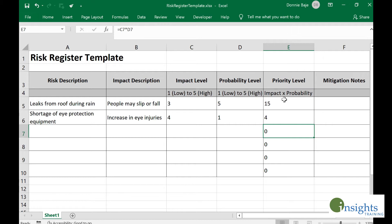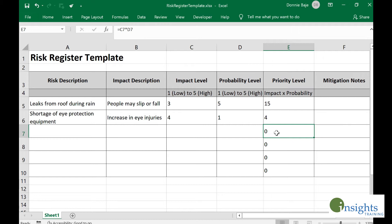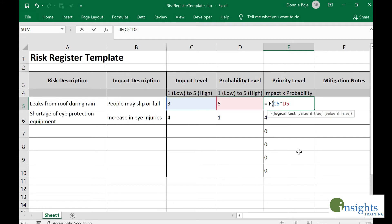What we're going to do is put nothing here if the value of the priority level is still zero. We're going to improve the formula by using logical statements. We're going to put an IF statement, and then we want to check two conditions or two logical tests before we perform this calculation, and that would be done by using the AND function.